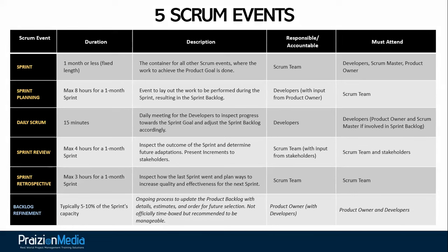When we say order, we mean prioritization, which is why the product owner is front and center here. Of course, working with the developers, but the product owner makes that final judgment call as to what is of value that needs to be done now. What is the next thing to do for the upcoming sprint?